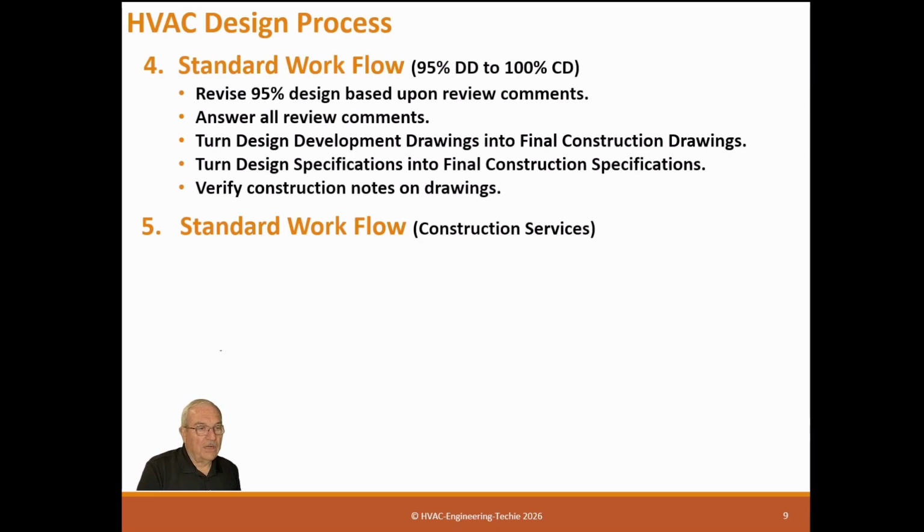It's really hard for a contractor when you look at the detail and you look at what we got, and they don't match at all. And what are you supposed to do? Well, you have to generate an RFI. So this creates more work for the contractors, and it creates more work for you. Now you've got to answer an RFI, all because you've got to look at the notes.